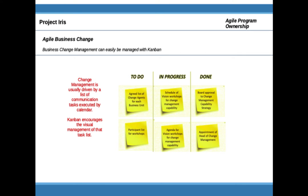Change management initiatives are typically driven from a plan that relies heavily on a list of communication tasks and events executed on a regular basis. Kanban encourages the use of a visual approach to working through that list of tasks. By having somebody with the responsibility to develop those task lists and flesh out what it means to perform each task, Kanban could be a very good tool to administer the business change tasks.